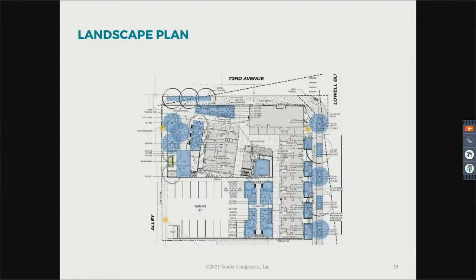Thank you, Dino. Heath Klein. Again, that does help. So, that would be part of, if we start to look at a CIP project to improve the alley, we would look to potentially extend that valley pan that carries the stormwater down to that inlet just on the north side of the drive entrance into the alley / 7-Eleven. So I appreciate you bringing that up and helping to answer Gary's question as to where that water is going. Thank you.